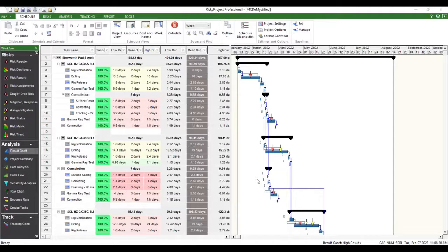And again, yes, the DCMA. What we run in there is the minimal requirements that you would see if you were submitting a schedule to the DCMA, which is the Defense Contract Management Agency. It's a standard, minimal schedule quality check that you'll see across a lot of different activity. A lot of different industries use it.